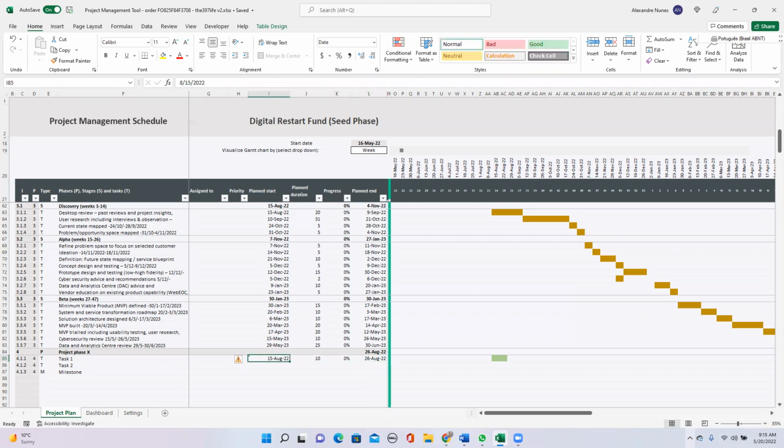I can enter the start date of the next task as it is, or I can even link both if I want. I'll just enter here the same date the other one ends, and I'll tell it this is 15 days duration. Okay. And then the end of that will be on September 15. And then I can tell the milestone that is project completion will be September 15.